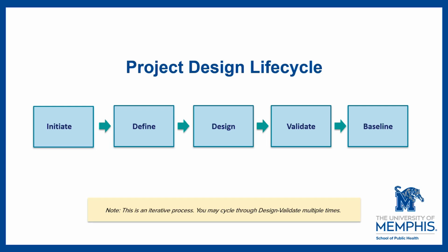The objective for the baseline is establishing a stable and approved reference for implementation. So before you implement anything, the baseline has to be signed off. And that means when everybody signs off, everybody's happy and systems go.